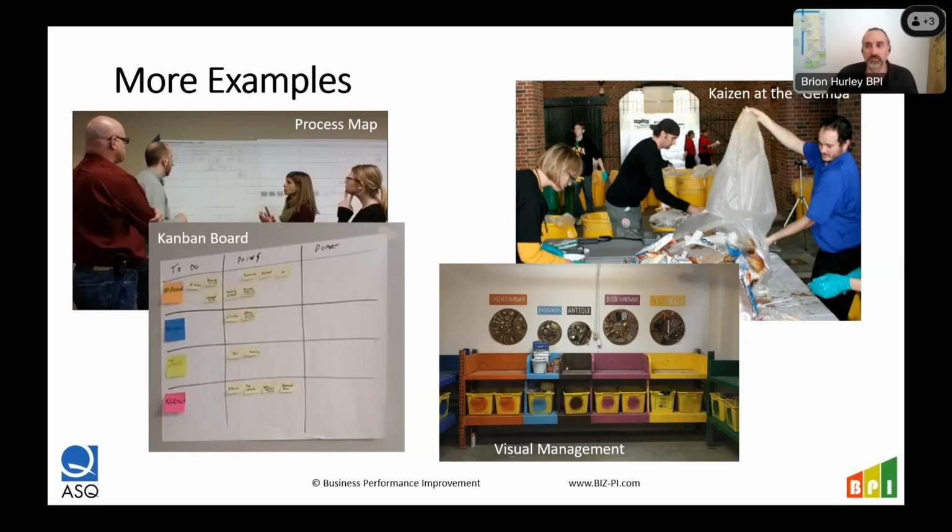Other organizations, we did a Kanban board where we have to do, doing, and done. A lot of times nonprofits get overwhelmed with the amount of projects and tasks that they're taking on. They've got passionate people who want to make a huge impact and they take on probably more than they can handle and they get burnt out a lot. That's a common issue I've seen or heard. And so how do we control our incoming number of projects and say, I can only do 3 or 4 projects at a time and still be effective and get those done? We know that if we overload ourselves, nothing will get done. So a Kanban board could be really helpful for an organization.